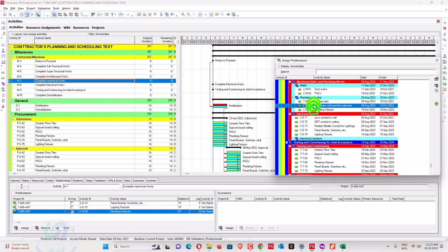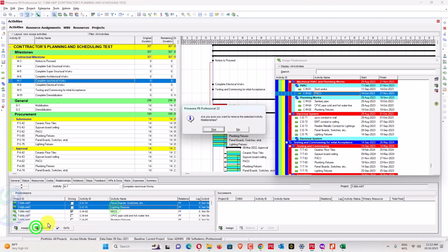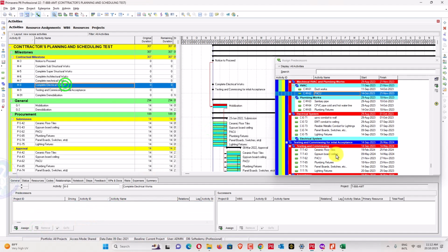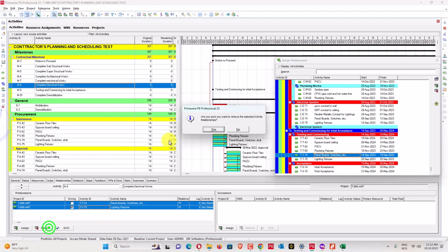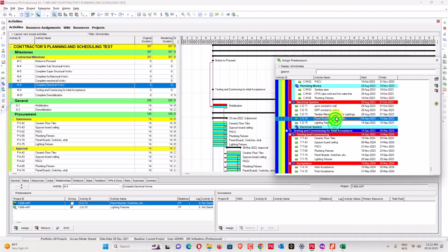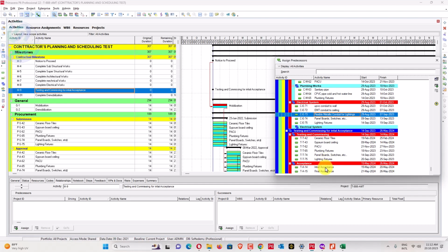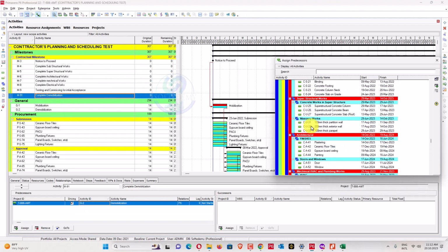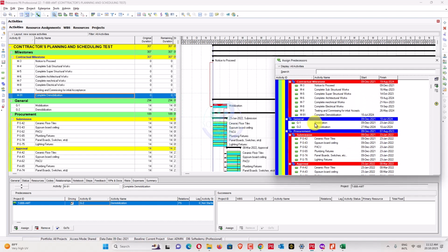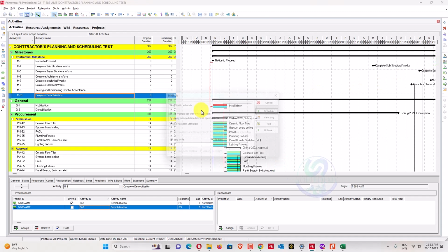No, it will finish on plumbing fixtures and HVAC PACU. So I think electrical work we have added wrong. Electrical work will be finished on this one, lighting fixture installation. Okay, this one is also wrong. Remove this one, and lighting fixture of this one. And the last one, testing and commissioning, will be finished on this one. What about demobilization? It will be done on the demobilization. There is an item of demobilization. Okay, so this is the linking of milestones I have done already.